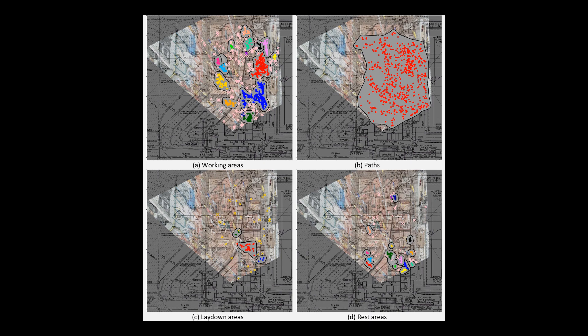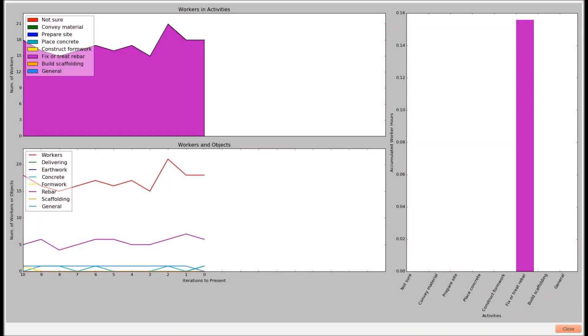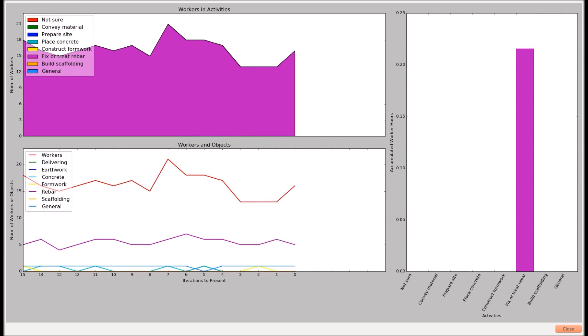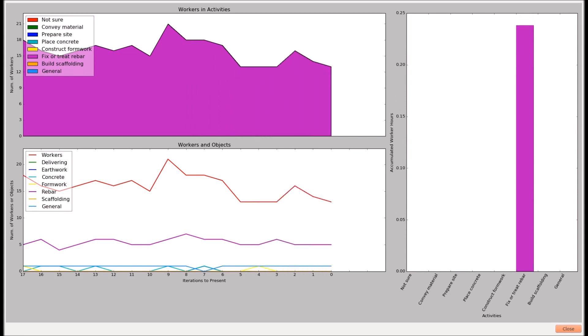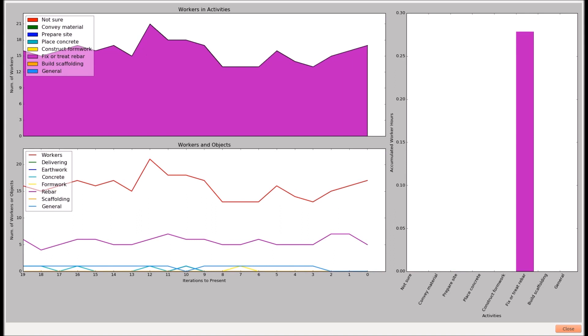PI is non-intrusive and requires little additional cost in its implementation, since surveillance cameras are commonly used on construction sites. PI has the potential to liberate human inspectors from tedious site inspections and manual documentation. Also, PI can be easily extended to improve site resource and safety management.